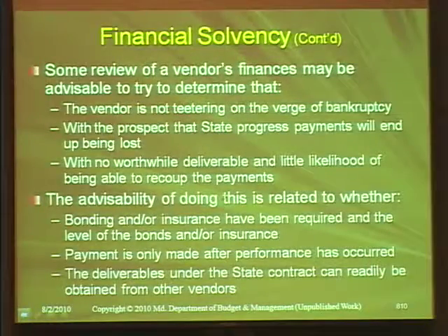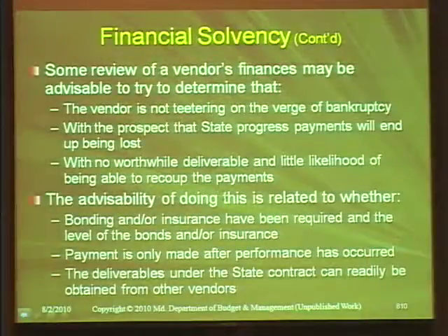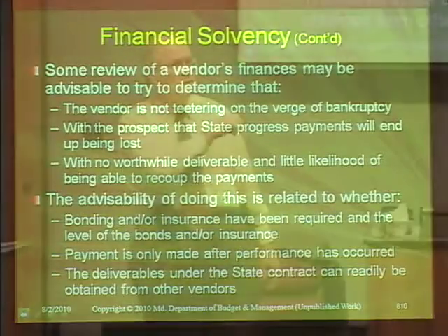Some review of a vendor's finances may be advisable to try to determine that the vendor is not on the verge of bankruptcy, with the prospect that we'll pay and not have anything to show for it. And the advisability of getting this type of information is dependent on whether we do have bonding, insurance, the level of the bonding and insurance, whether we're only going to pay after something has occurred, not something where we may be paying in advance, and whether the deliverables under the state contract can readily be obtained from other vendors. Those are facets that go into this.